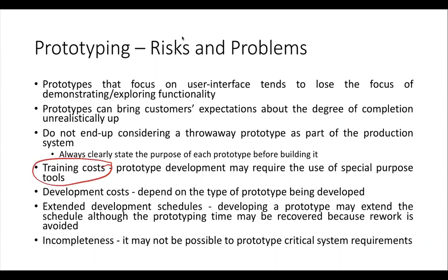We also have training costs associated with prototyping, especially in the development phase of the prototype, because it requires some special purpose tools. In addition to training cost, there's also development cost, which depends on the prototype being developed. There is also an extended development schedule. Developing a prototype may extend the schedule itself. Although the time spent on the prototype may actually be recovered because rework is avoided, it still adds up to the overall development schedule.